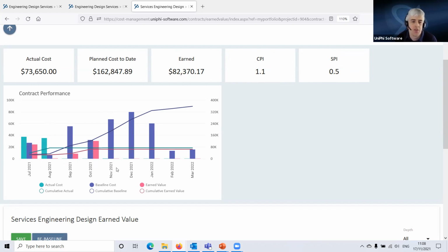And I think the situation here could be that this project has been put off or delayed and it hasn't been reforecast to take that into account. That would be a reasonable thing to assume from this without knowing the gory details. But we can see that there was a whole lot of effort not done in September, and that is pointing to this significant delay here. This is telling me it's 50% behind schedule based on the effort that's happening.